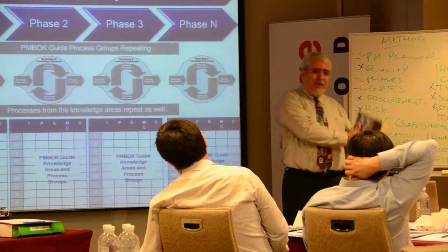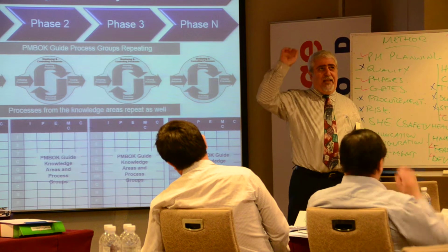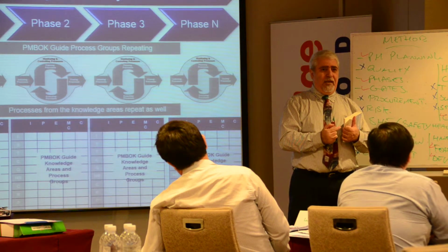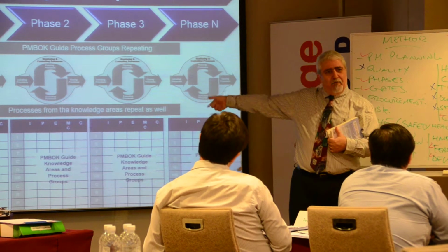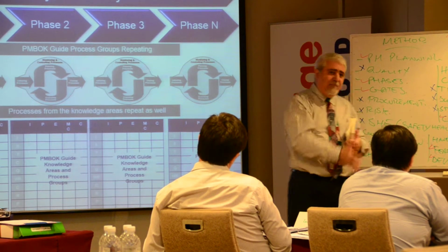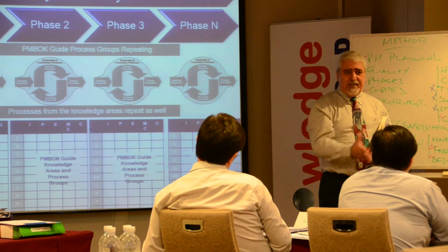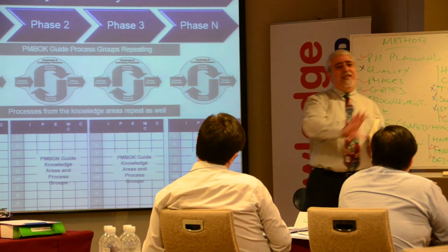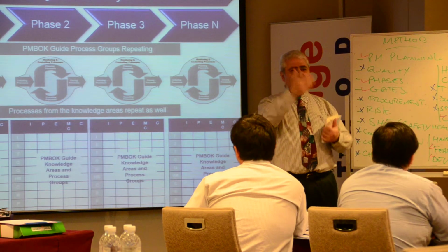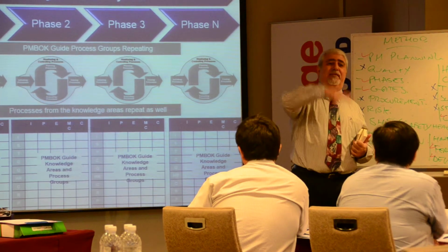There are management processes within what PMI calls the project management plan. I think in the 2000 edition there used to be two plans, and then they merged them together. So my project management plan in my book is not the same as the PMI management plan. There are management processes, like how to manage scope, how to manage cost, how to manage time, how to manage risk. And then there is a technical process, like in scheduling: developing the schedule, sequencing, activity lists, critical path analysis. This is detailed scheduling. This is not management.